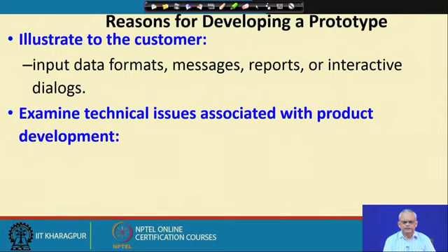And that is the reason why for almost every project the GUI part is developed using a prototype model, and even for some software the entire development is according to a prototype model, but the GUI for every project typically is through a prototype model, where a quick prototype is made for the GUI and the client feedback is obtained.